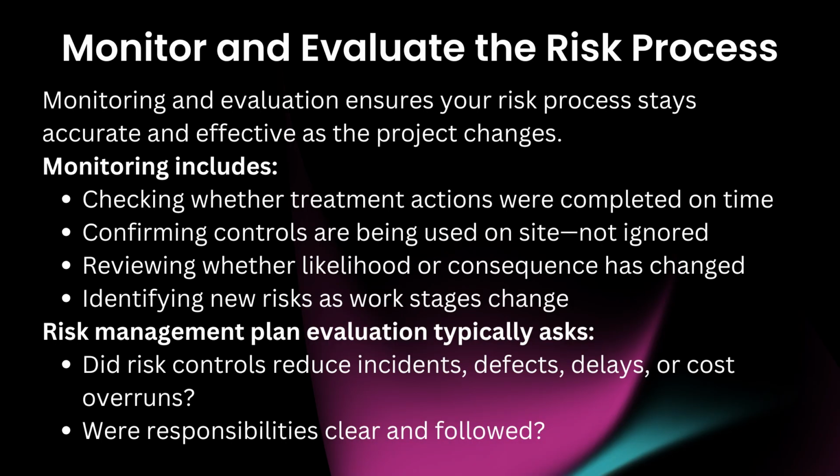Monitor and evaluate the risk process. Monitoring and evaluation ensures your risk process stays accurate and effective as the project changes. Monitoring includes checking whether treatment actions were completed on time, confirming controls are being used on site, not ignored, reviewing whether likelihood or consequence has changed, identifying new risks as work stages change.